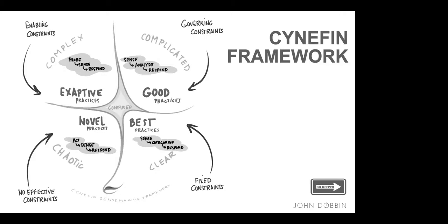As developers, the first thing you want to do is to probe. What probe means is a bit like question. So you want to start to question the business. What is it that you want to achieve? What are the most important things to do? Do you still want this feature? How do you see this working? In an IT sense, that probing is a lot of questioning of the business users and the end users to see what they want, to try to get some sort of clarity.